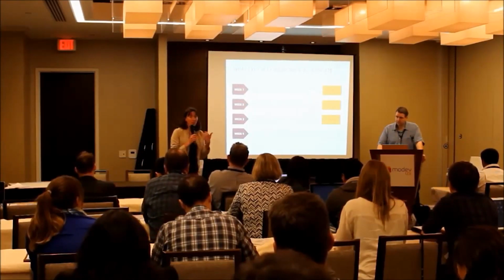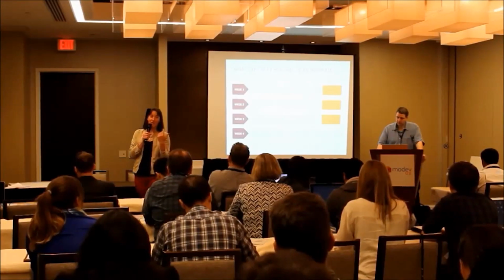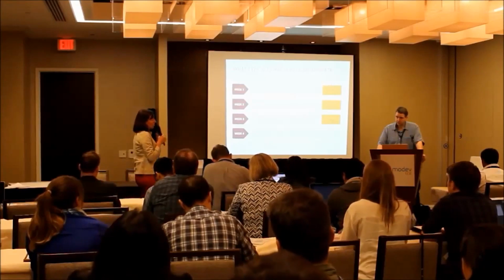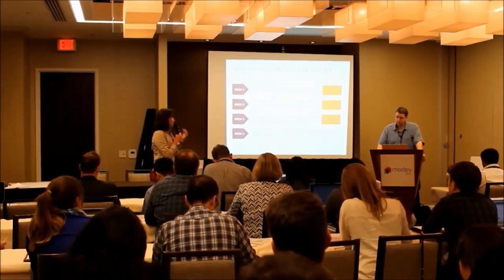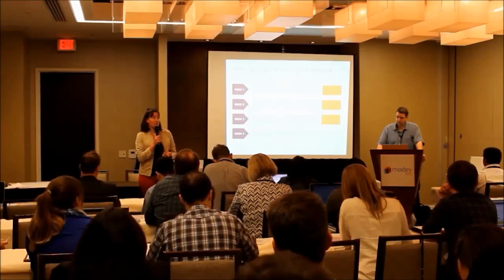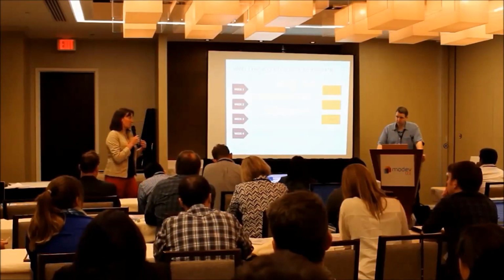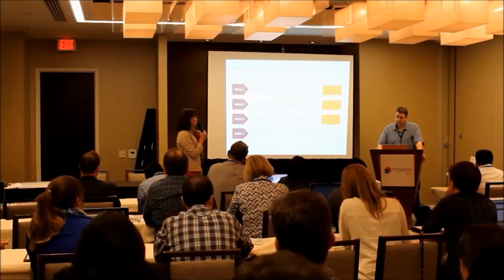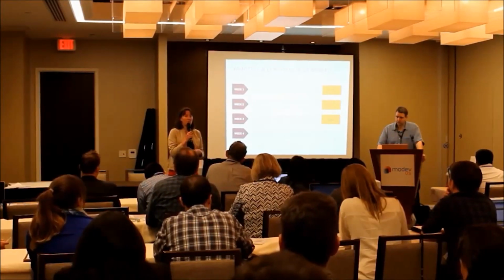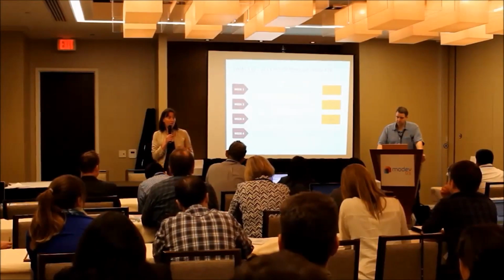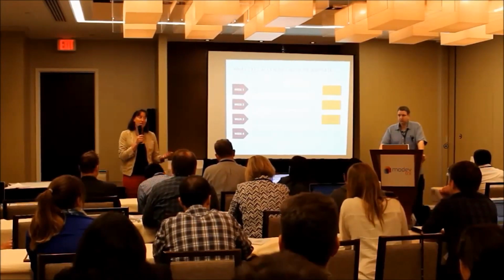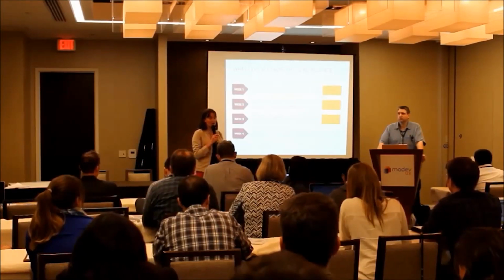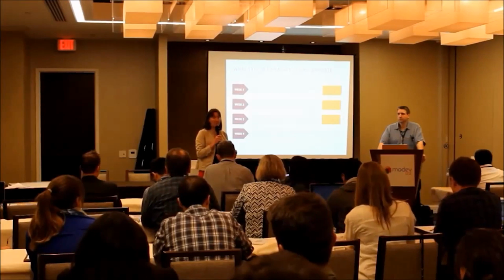So this is more, and I should probably tell you, as I was looking, my question I would ask is, what do the teams look like? So typically, these are teams of 2 to 3. It'd be a product manager, a UX person, and maybe a UX engineer like Eric who's building the prototype. So the UX designer and the prototyper would probably be allocated pretty close to 100%, and then the product manager will come in or out. And I come in and out depending on where the engagement is. So it's really a small team for a fixed amount of time.